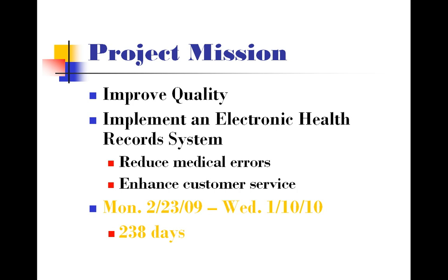We utilized the Microsoft Project program to plan our project and decided our start date to be Monday, February 23rd, 2009. The program helped us estimate the duration of this project to be about 238 days and projected that the end date would be on Wednesday, January 10th, 2010.